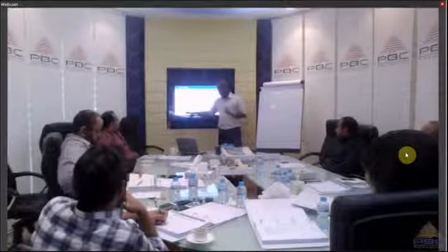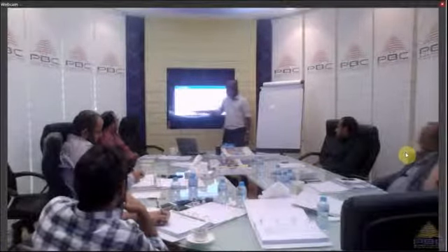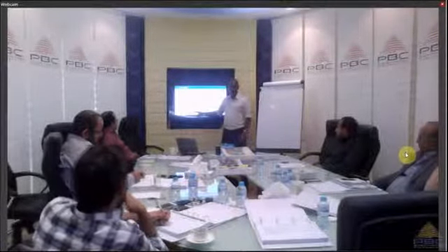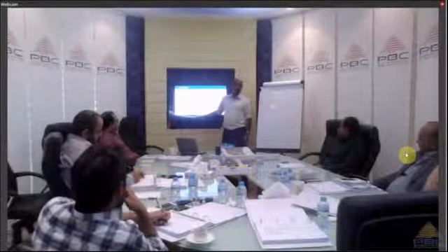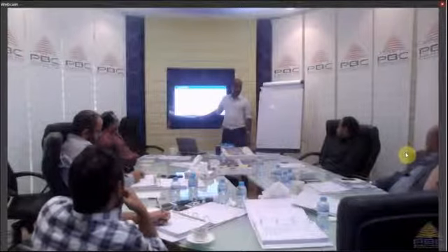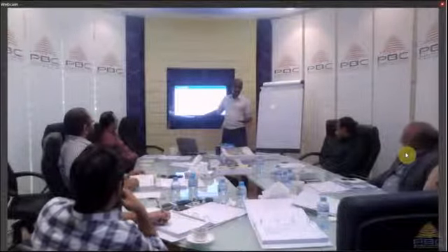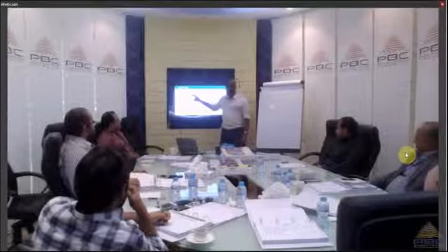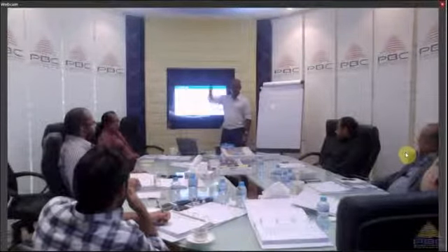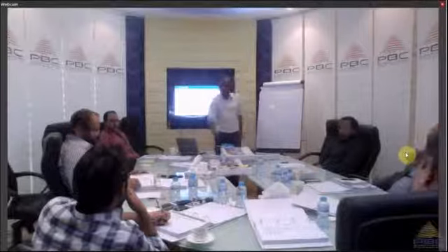So when you list the assumption and say, well, I assume Ta'ziz Tower that you have a permission for construction already issued. That's an assumption I make as a project manager. The client might look at it and say, no, we don't have it. So it becomes part of the scope and so on and so forth. Let's do it.